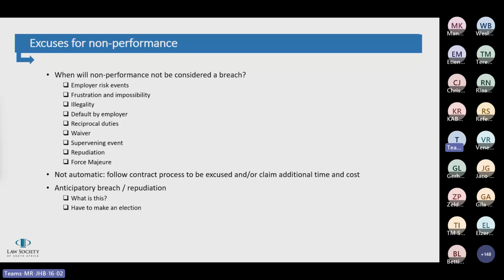In the event the cause of the impossibility was foreseen or foreseeable, and it could have been avoided, then the parties cannot rely on this doctrine to not perform their obligations. Once the force majeure event has come to an end and performance has become possible again, the contract will continue. The creditor will have the option to terminate the contract if the interruption is likely to endure for an unreasonably long time, and in some contracts, both parties would have that option.